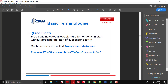Free float is the allowable duration of delay in start without affecting the start of the successor activity. Such activities are called non-critical activities. The formula is: early start of successor activity minus early finish of predecessor activity minus one.